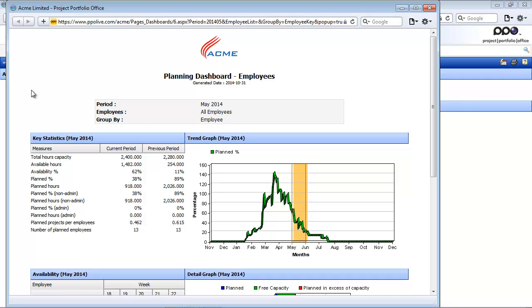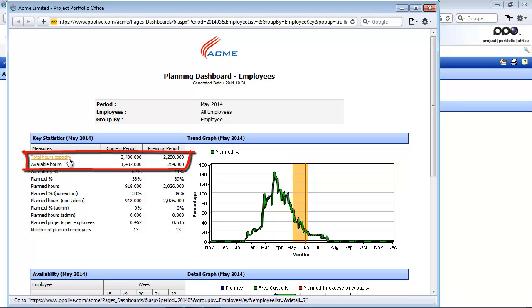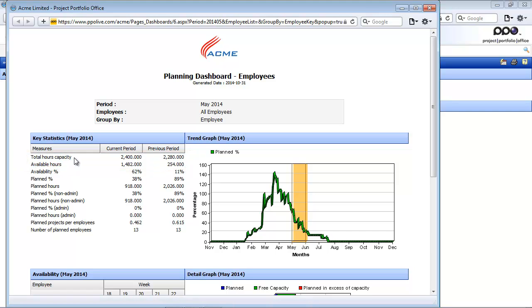The dashboard calculates the working days for the selected month and excludes public holidays captured in PPO. For example, a standard working month may have 20 working days. If I have 10 employees included in my capacity and all of them work the standard 8 hours a day for a total of one month, then the total hours capacity would be 10 employees times 8 hours a day times 20 working days, which equals 1,600. The available hours is then calculated by taking the total hours capacity minus your planned hours.